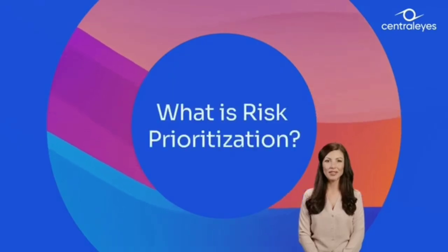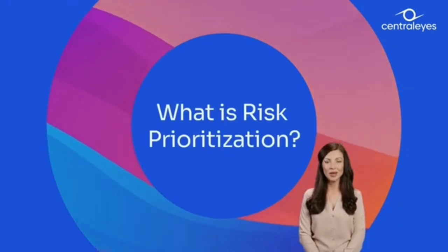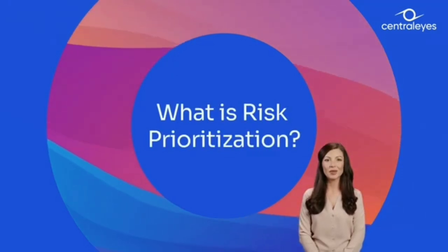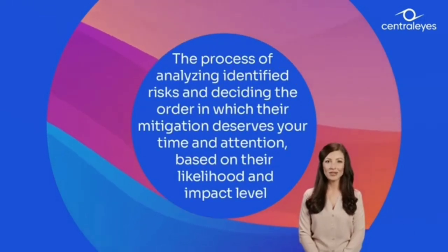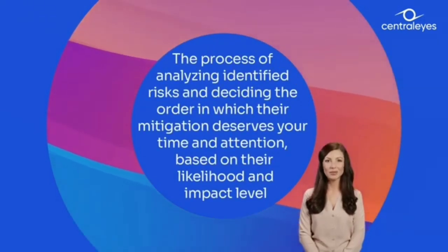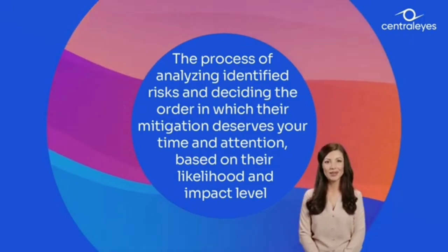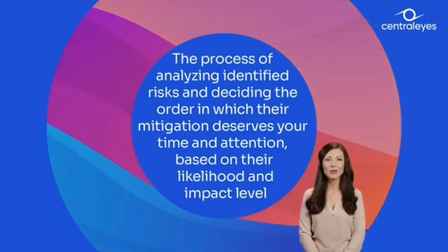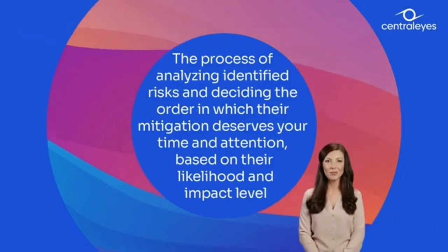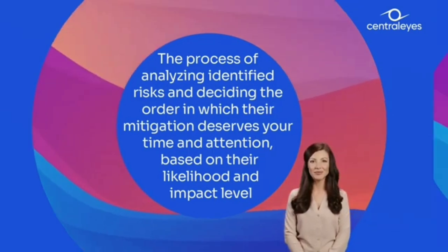What is risk prioritization? Risks may be infinite, but sadly our time and budget are not. Risk prioritizing is the process of identifying the most critical risks so they can be addressed first. Priorities should be set using the likelihood of a risk and the potential impact it poses to the company. A major purpose of prioritizing risks is to form a basis for allocating resources.